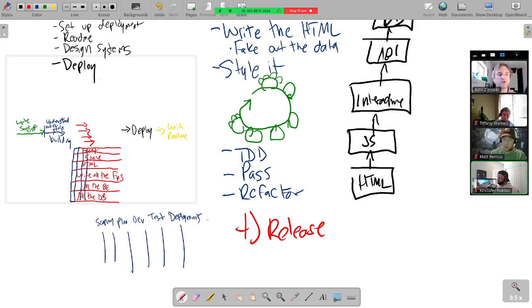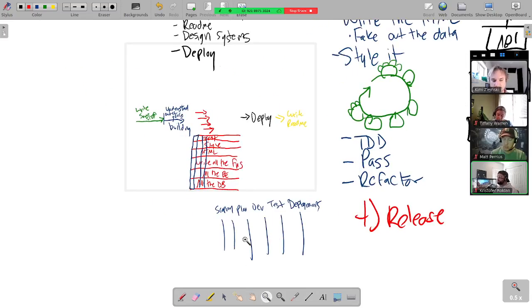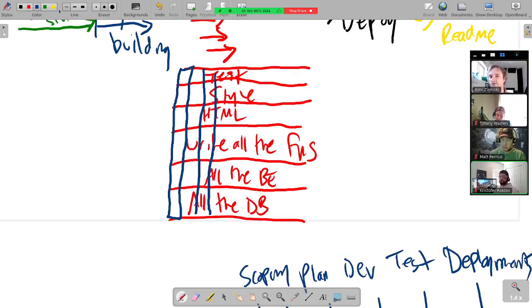And what eventually happens when you keep working this way, we do a thin vertical slice. We do a thin vertical slice. We do a thin vertical slice. We do a thin one, and then we run out of time. And so we go, okay, cool. Scrap that. And cool, we got 3 features done. Not, oh dear, just slamming, trying to get everything styled, trying to get all the tests ready, and this whole panic. You can't do more than you can do. And so if what you could do is 3 stories, yeah, I got half of this one started, throw it out. We're calling it a 3-story app.